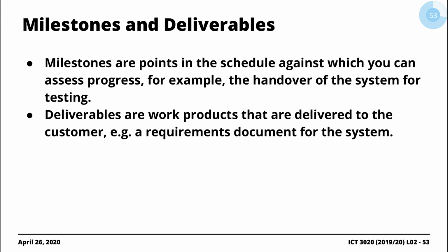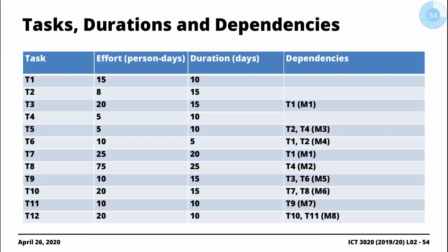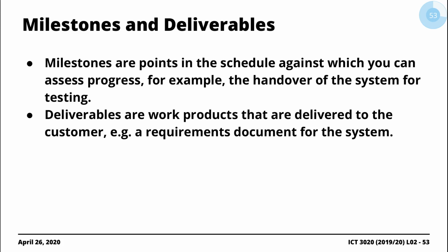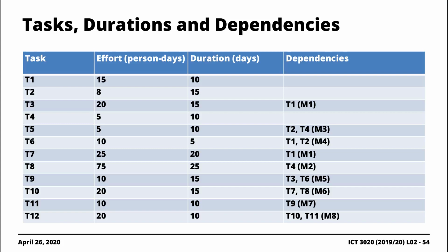And so typically, at a bare minimum, as input to these different charts that we are going to look at, you want to come up with information that's presented in this manner, right? Each task must have an ID that uniquely identifies it. You obviously need a name associated with the task. You need to indicate the relative effort, although this is optional, but duration is important, obviously. Relative effort would be man hours or person days associated with that task, the duration, and whatever dependencies might exist for that particular task.